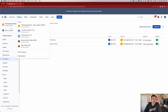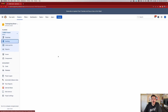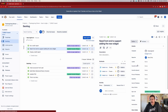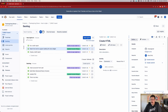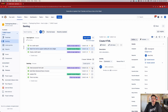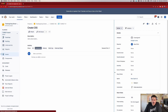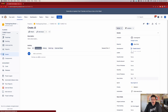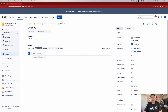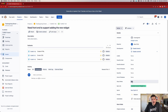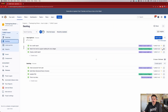We're going to go back to the project and back to our backlog. I don't expect this to work immediately — we need to go into a subtask and trigger an update. So I'm going to go into the HTML subtask and change the story points to 2 and hit the checkmark. Jira should now do 2 plus 8 plus 13, which equals 23. Sure enough, when I go back to the story level this number says 23, and in the backlog it also says 23. It automatically summed up all the children subtasks.